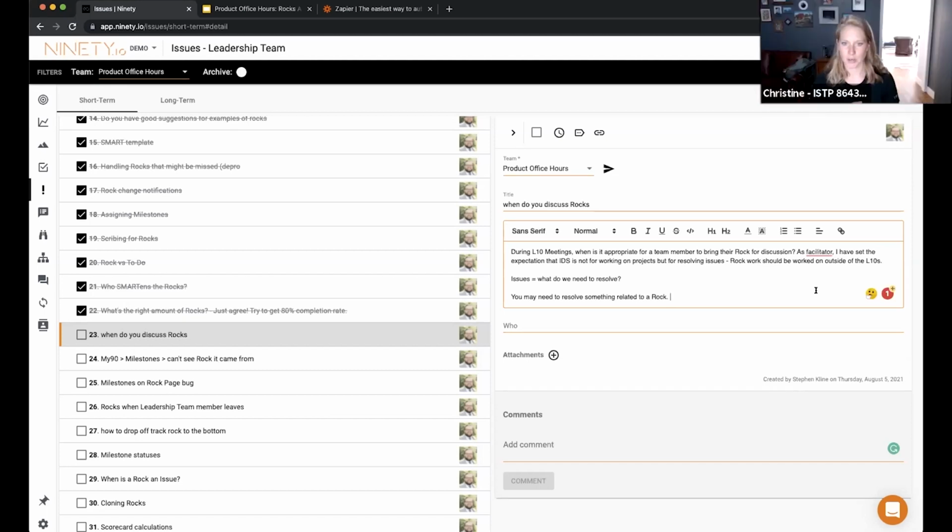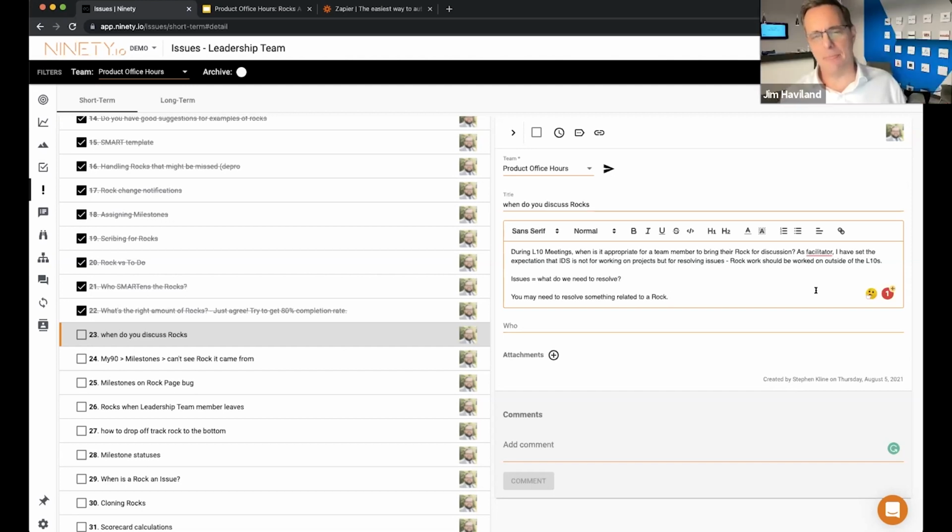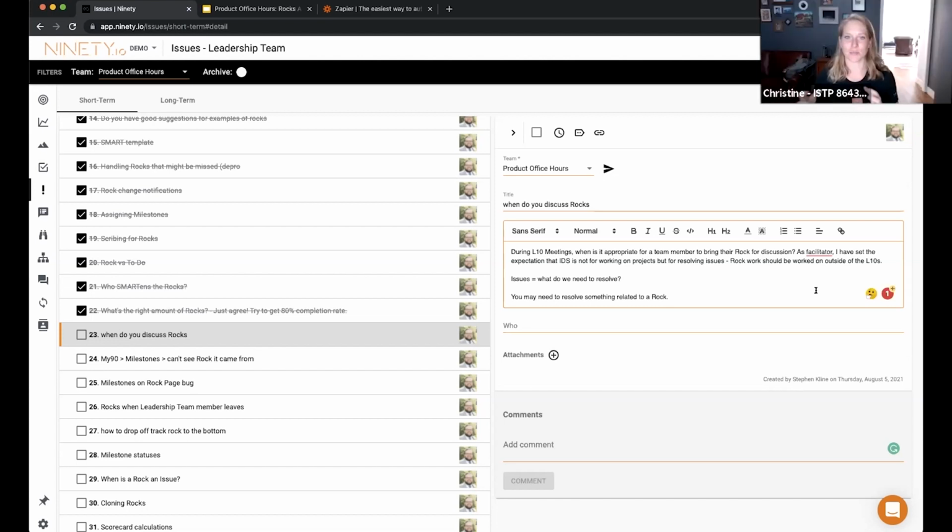Yeah, and I completely agree with this person. IDS is not for working on the rock. You're not doing a presentation or a status update or anything like that. Any work happening on the rock, you might need to set up a separate meeting, like, hey, this is part of a milestone, I need to show you guys this and get approval on it. Issues is for, like you said, Jim, trying to resolve this because it's off track, and if we don't resolve it, the rock is at risk.